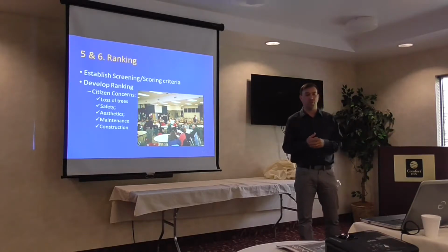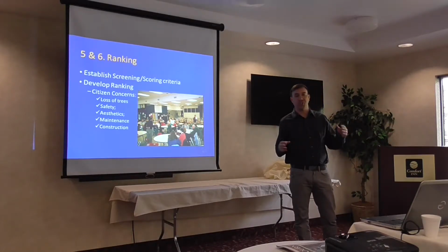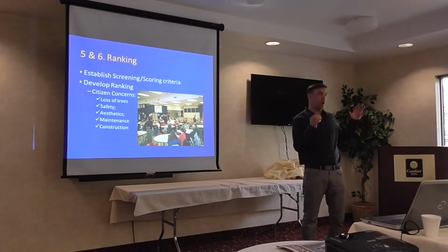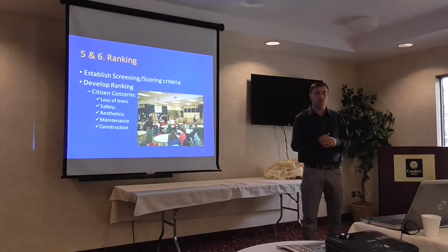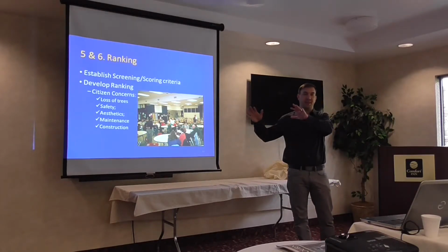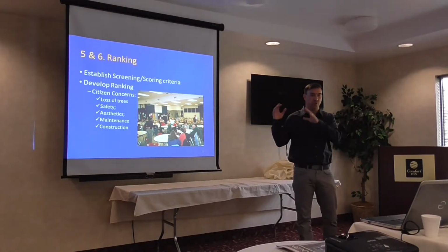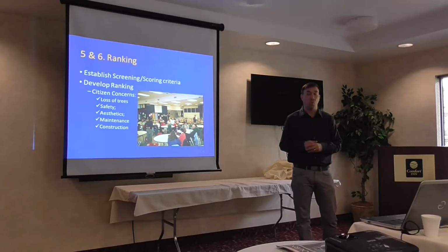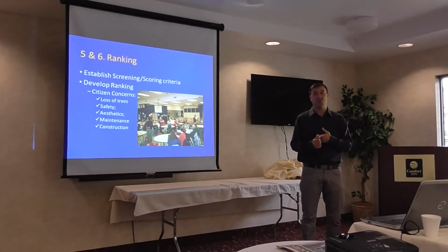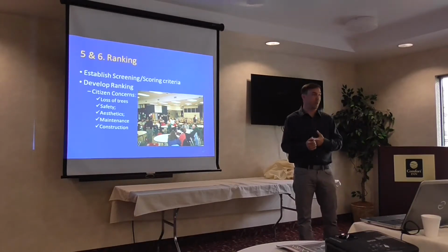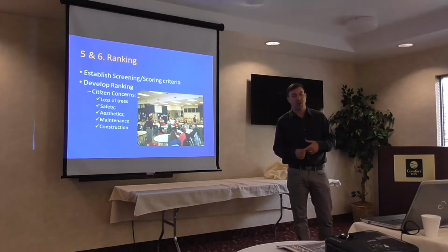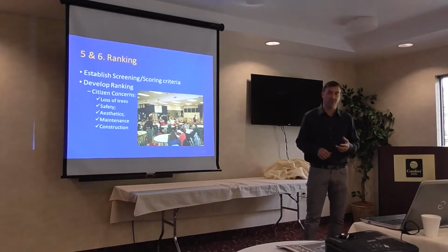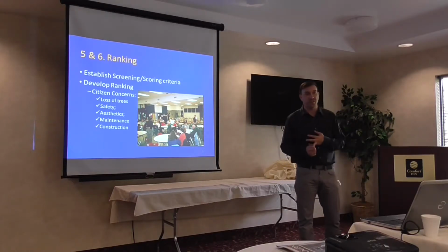So Tom went through a number of plants and some different strategies for doing bioretention. Some are up front, and you want them looking nice, and you want to be prepared for maintenance. Others are in the back, and if they don't look great, it's okay as long as they're working well. What are the long-term maintenance needs? That's a big one. We're going to build this thing, now we have to maintain it. So what is it going to take? What is the maintenance interval? How much does it cost? And then, of course, construction costs, construction timelines. What season does it need to be in?